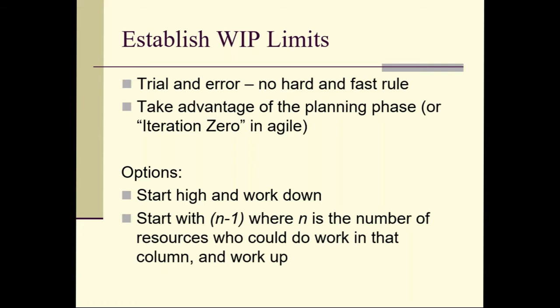So if I had 3 designers, maybe I would accept 6 things. Each person has 2 things to work on, the main one and a backup one in case the main one is blocked. Maybe that's fair. But there's some trial and error around this. Figure out what is the right number for your people.